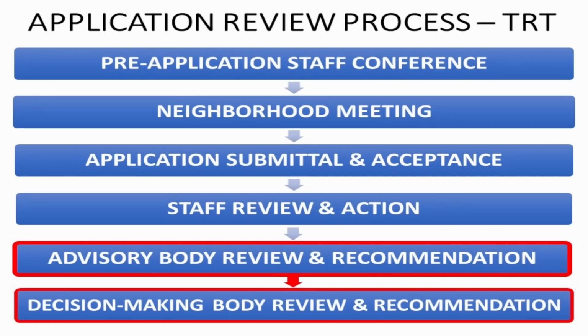If an applicant is denied, what's the process? Do they have to start over, or do they need to go back and do what they should have done? So there is an appeal process in our Land Development Code. So they do have the opportunity to appeal based on what the application is being denied for. And the Land Development Code identifies different reviewing bodies that would then review the appeal process.